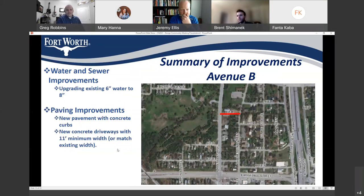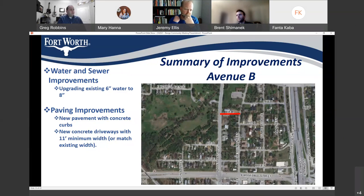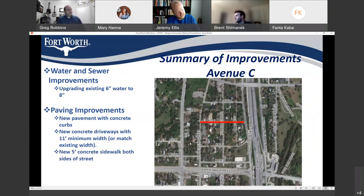A lot of the improvements are similar on each street. On Avenue B, we'll be upgrading the existing 6-inch water to an 8-inch. For paving, new pavement with new concrete curbs and replacing the concrete driveways along that street. On Avenue C, we'll be upgrading the existing 6-inch water to 8-inch, new pavement, new concrete curbs and gutters, new concrete driveways, and Avenue C is getting 5-foot concrete sidewalks on both sides of the street.